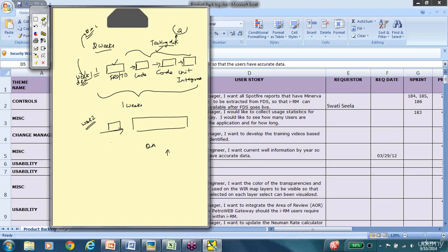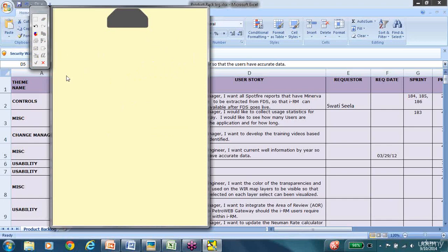Okay, since this is extremely cumbersome in order to schedule and coordinate and all that, we came up with the best practice that we used to follow in our team, which is 1 sprint lag for testing. So this sprint completely was a development sprint. The testing team, the Scrum team, and everybody will still be the same. The testing team will still attend all the sprint 1 meetings. Everything is still the same, except that while the development moves to sprint 2, that is when we used to do testing for sprint 1.